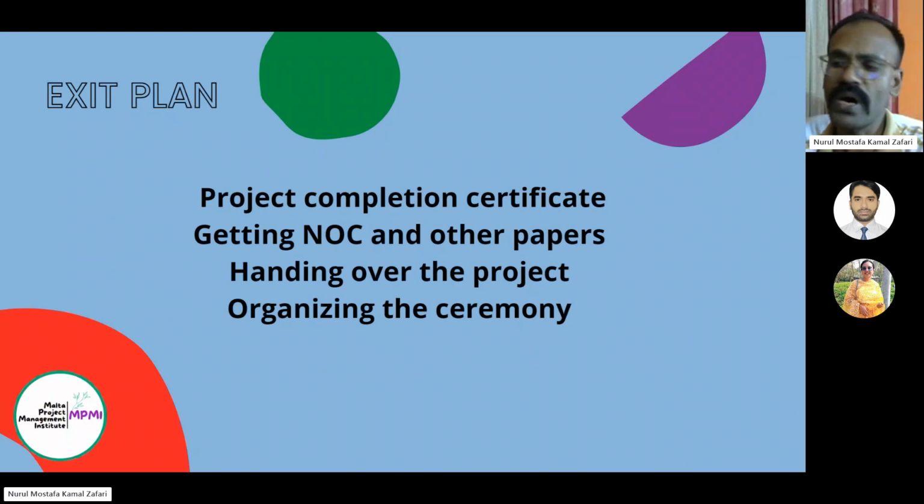Then the exit plan. What will be the exit plan? Because no project will stay forever. So what will be the exit plan? You have to write down the exit plan with deadline and responsible persons.